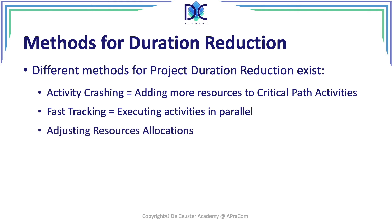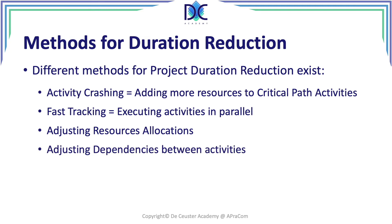We can also look at adjusting resource allocations — moving resources from non-critical activities to critical activities to find ways to complete those activities faster. The people assigned to those new activities need to have the competence to do the work. Alternatively, we can put people in supporting roles, helping those with the knowledge to concentrate fully on the work.